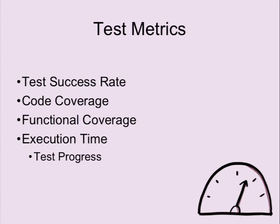And if you realize this fact at the very end of the testing period, you're screwed. So you should have a tool to actually monitor the progress of the manual test execution during the test phase, so you can create countermeasures like finding the root cause. Why for this release does the test not progress as fast as expected? Or maybe we don't have enough test resources from the end users available. So really keep an eye on the execution time, from the tiny units like unit testing to the huge time scale like manual testing when you do release tests.